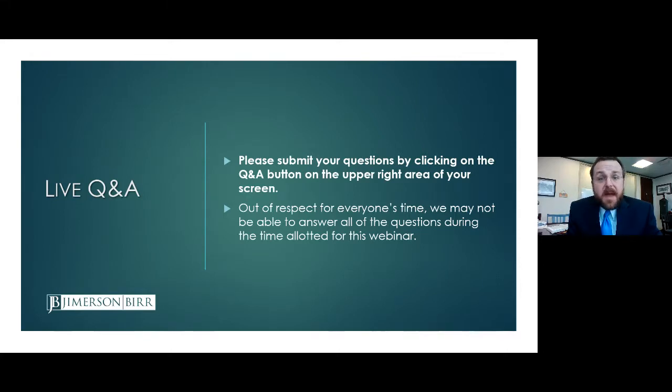And so how do you find that out? Well, there's a statutory mechanism in 713.23 subsection B that allows you to serve a request on the contractor or owner to get a copy of the bond. And actually a best practice of ours is to include that request in your notice to owner form. So the notice to owner form that you use on most of your private projects where it's a construction lien job and not a bond job, you just add that request into the bottom, and it's kind of a safety valve. If the owner or contractor have a bond but it's not recorded and they don't provide it to you in response to that notice to owner request, they are then liable to you for any damages that you suffer for their failure to provide you a copy of the bond.